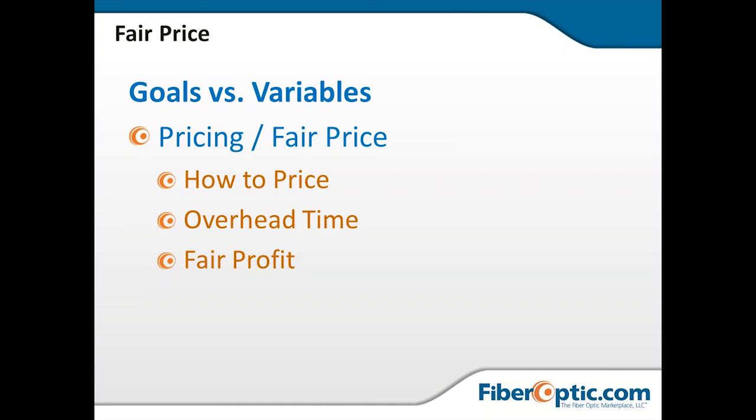Google is one of the ones that we talk about. Google sets the price and actually asks you what you want to make, and then they have a form factor that says here's the margin that will allow you to make on us, based on what you're paying your people. So it actually doesn't start with you as a company deciding what you want to charge them. They ask, what are you paying your people?